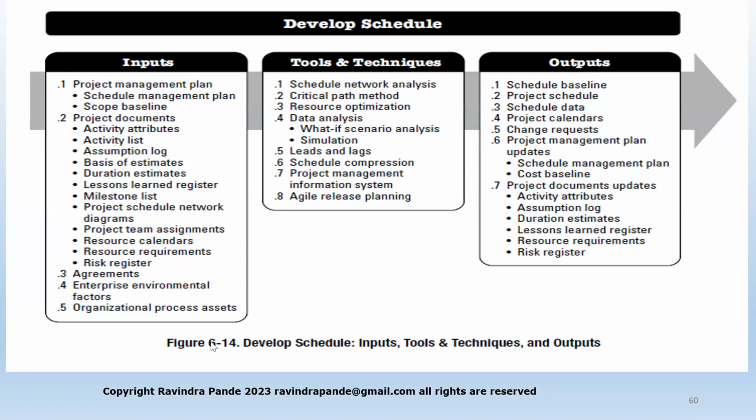So there are agreements normally in place in today's modern world, where if there is any delay to the release or delivery of the said product feature, we might penalize you financially, with punitive clauses as they are called legally. That's why we need to understand if there are such agreements whenever managing a project. If there are, we need to make sure we are not penalized for any delayed delivery, and that's what we need to consider as an input to develop schedule as well.